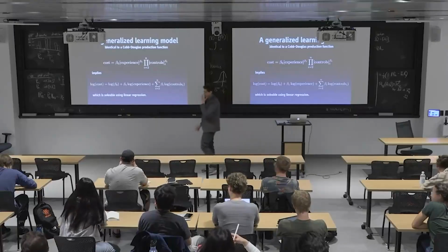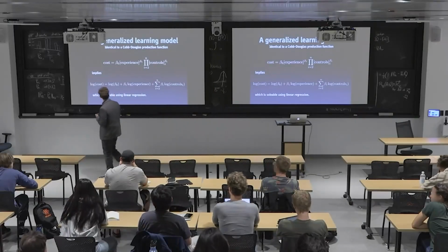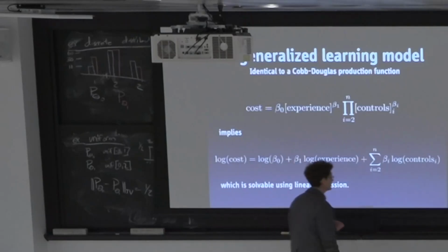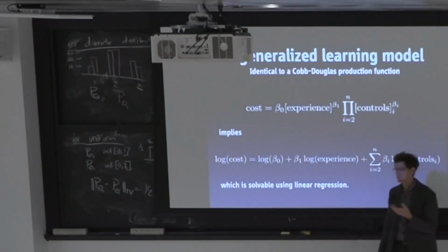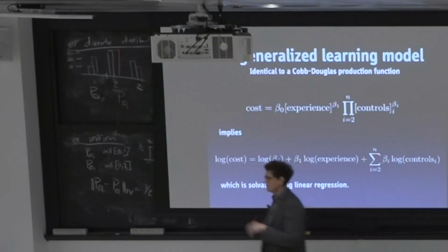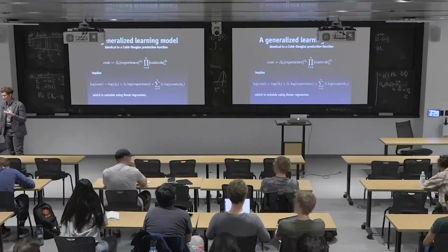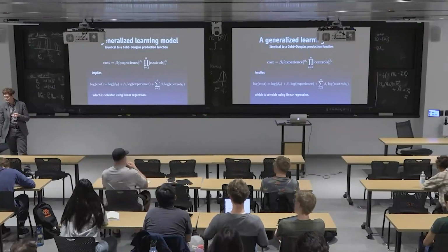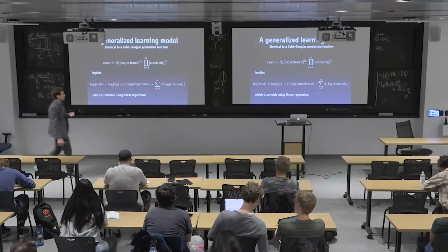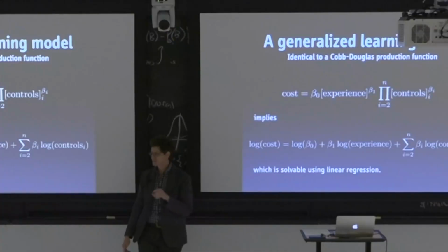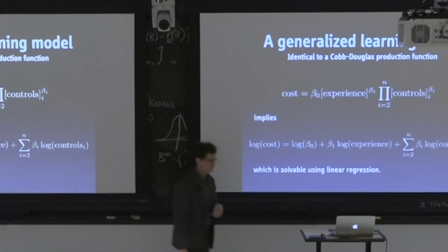It's just a kind of weird question regarding the equation. What actually are we measuring for experience? Is that like literal years spent in building reactors? You can do it in different ways. I think, ideally it would be man-years of reactor construction, but these data are hard to come by. So the way most people do it is just by number of reactors built. Some people have proposed looking at kilowatts of capacity built, but I think that's probably sub-ideal, but you could do that also.